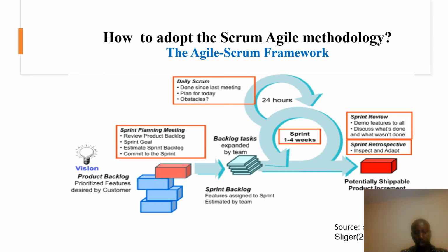At the end of the sprint, the team demonstrates the work they have completed to the stakeholders and gets the feedback that will affect what they work on in the next sprint. They also hold a retrospective to learn how to improve. This meeting is critical as it focuses on transparency, inspection, and adaptation.